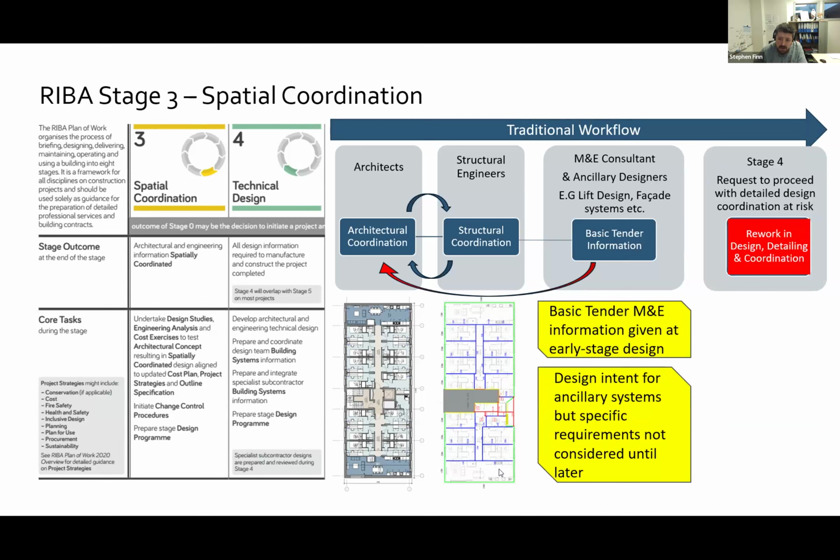And again, quite often due to time constraints on projects and due to whatever commercial reasons, it's sometimes on projects, M&E consultants and these ancillary consultants may not even be appointed while we're being requested to proceed with stage 4 detailed design of our systems and detailed coordination.